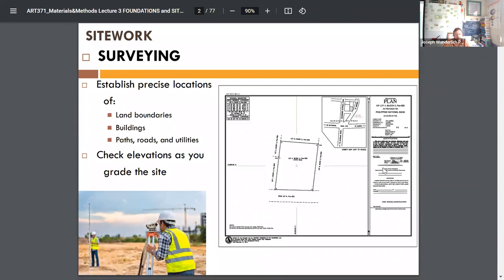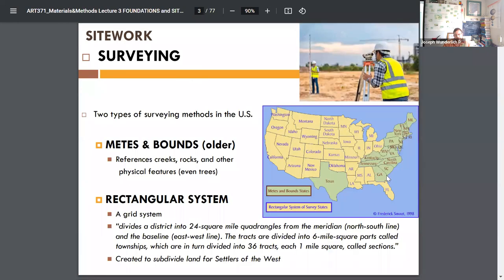Site Work and Surveying: when you get some land and buy a lot, it's been surveyed, presumably — not always — so you may need to survey and subdivide it yourself. You establish precise locations of land boundaries, buildings, paths, roads, utilities, and check elevations. You need to grade the site with cut or fill. There are two surveying methodologies in the US: the traditional metes and bounds, going from creek to rock, and rectangular coordinates on a grid following latitude and longitude lines, broken into smaller pieces.